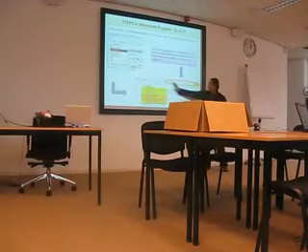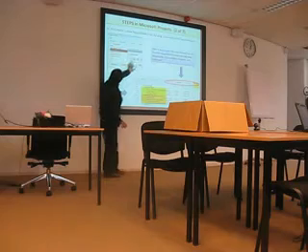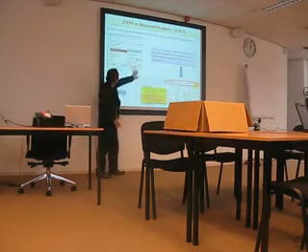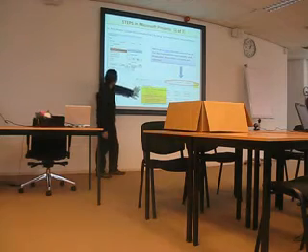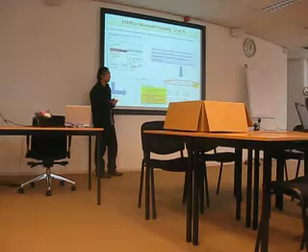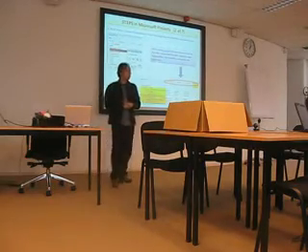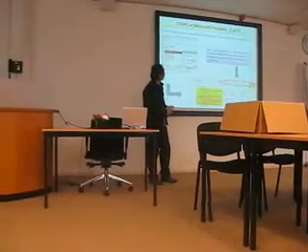We make a custom field, for example, who is responsible, and then we make a lookup table: who will be responsible, who will approve, who will be informed. It's a kind of RACI matrix. It is just a trick. There is no such feature in Microsoft Project actually, but you can do it by using a custom field and custom report.